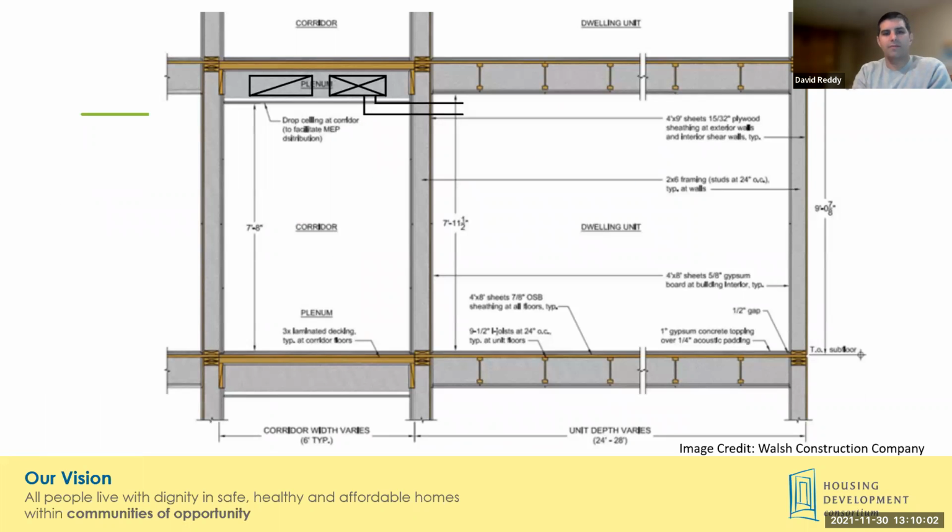One real life lesson learned, actually this came up in a very recent project, to illustrate this pitfall: the schematic design narrative included a corridor floor by floor approach, and the team moved on into DD and brought the contractor in, and the contractor highlighted pretty quickly, this is going to be a problem.